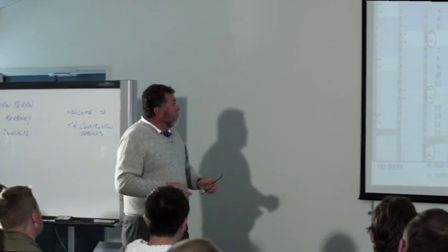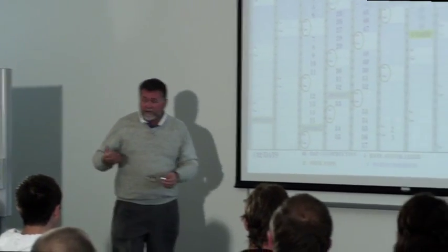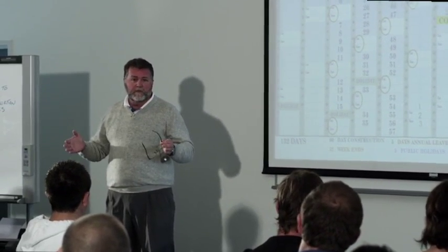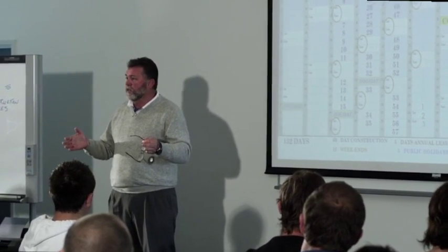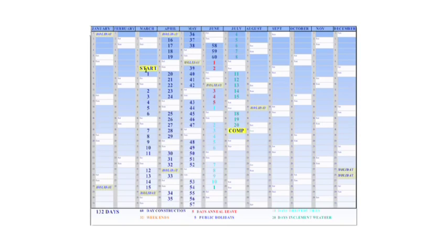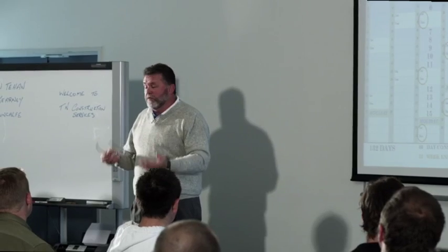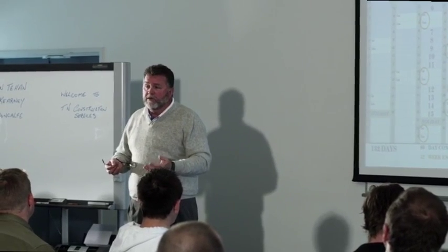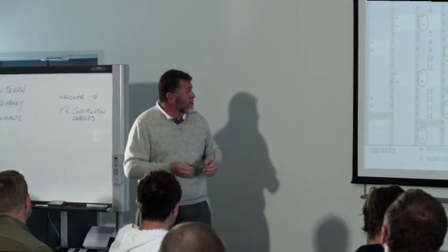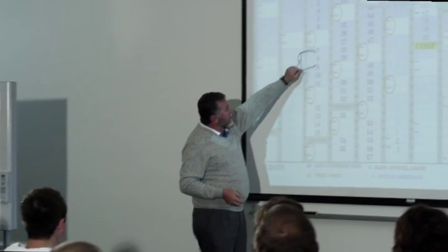So what you need to do, and that's why part of the exercise in your assessment book is about setting out a time flow chart. Remember doing that part? Has anyone not done that part yet? You're required to do a time flow. The idea is to say, okay, if I get this job, when can I start? Renovations are probably the hardest thing to determine, but I reckon I can get it done in, say, 16 weeks. So the 16 weeks are the Mondays to the Fridays.